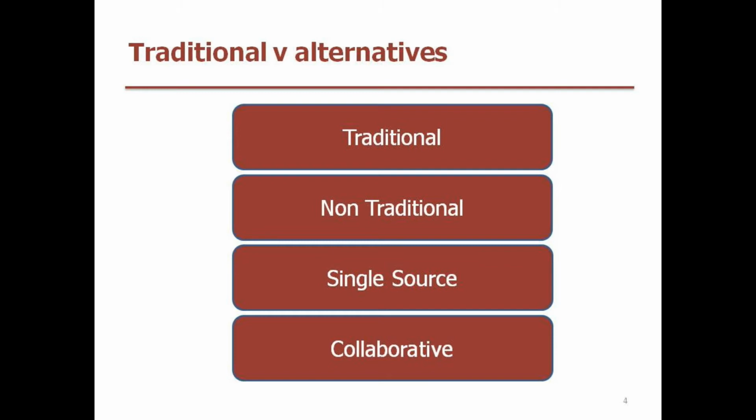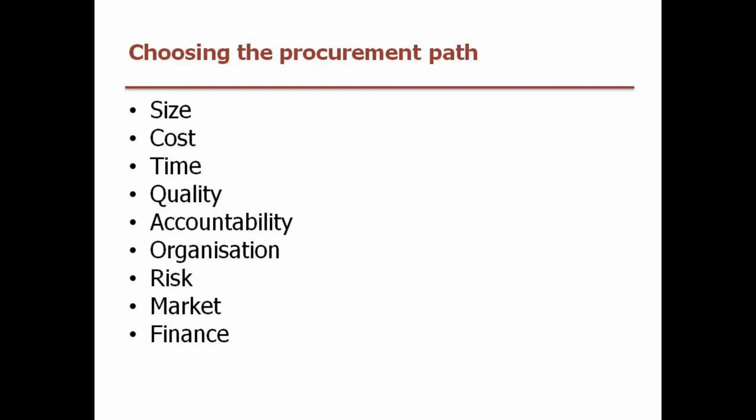Finally, probably one of the most important is the financing costs, which is 100% at practical completion. So we can say on the collaborative, which is the partnering, in the bottom square there, that it's used generally on larger projects, and equity and financing are shared, but the builder definitely buys into the development.